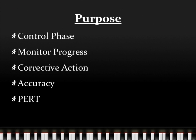When calculating planned durations, accuracy is of the utmost importance. A technique called PERT takes into consideration the optimistic, realistic, and pessimistic durations for any given activity and then calculates a weighted average. This measure will be used in the following examples.